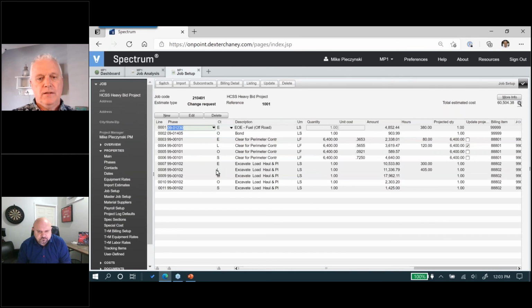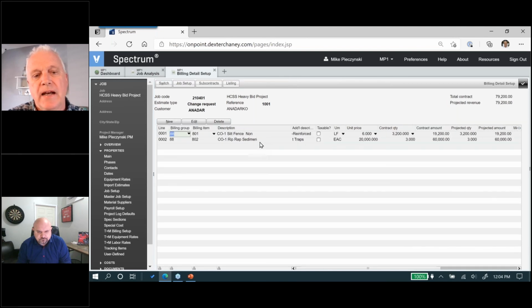So we've created the change and we've uploaded what HeavyBid provided to us. And that was the estimate in terms of the phase breakdown. Very similar, the same thing actually as the original. And I've got my total of 60 and change here. And then I've also got billing items and I can see those with the total of 79. So it's the same process.